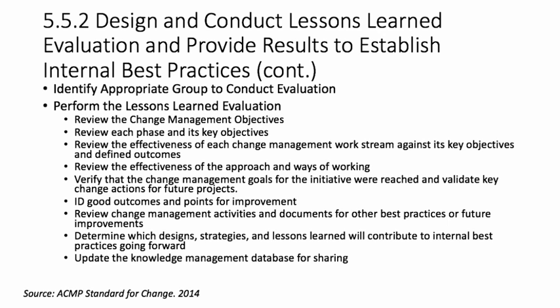The purpose of bringing the key individuals together during this process is to review the change management objectives, review each phase and its key objectives, review the effectiveness of each change management workstream against its key objectives and defined outcomes, review the effectiveness of the approach and ways of working, verify that the change management goals of the initiative were reached, and validate key change actions for future projects.